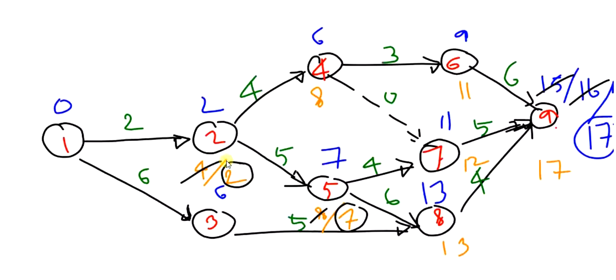We will be cutting this one, and we will be considering 2 as the TL of the second event. Then for 1 also there will be two values, that is from 2 to 1. 2 minus 2, that is the TL value of 2 minus the duration 2 will give you 0.